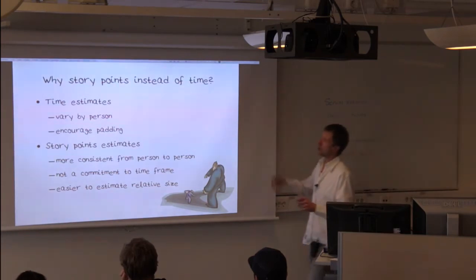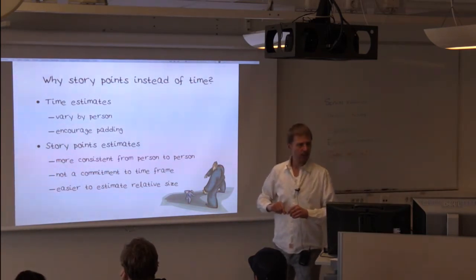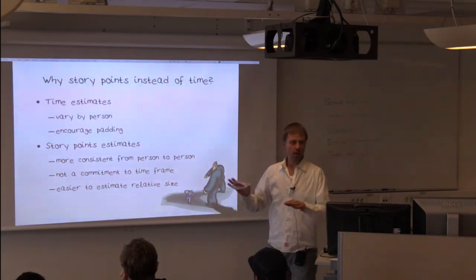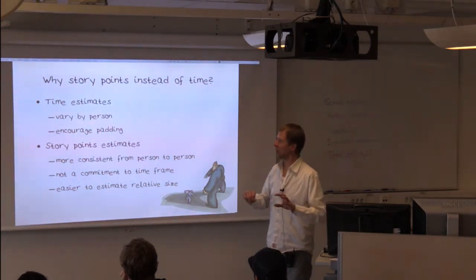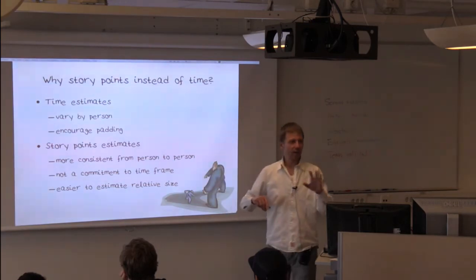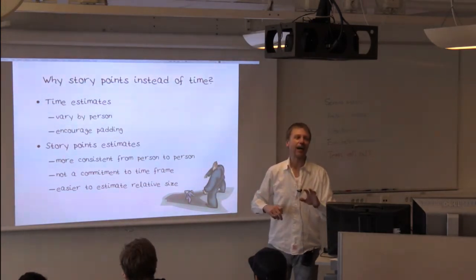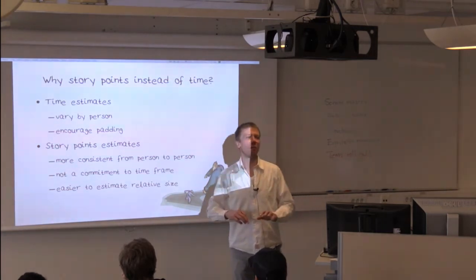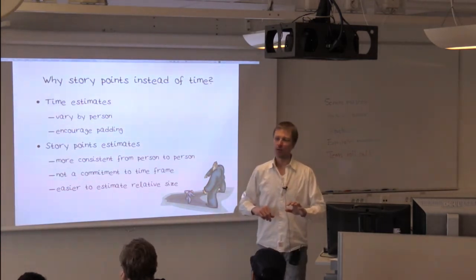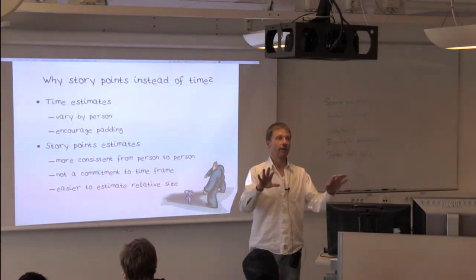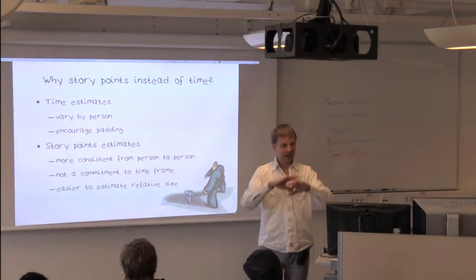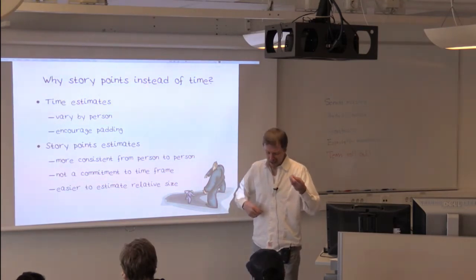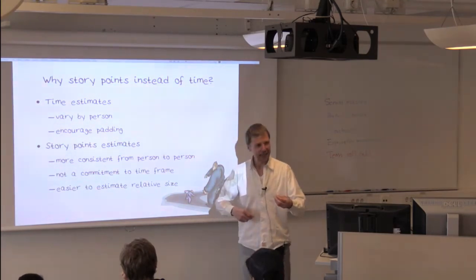So why do we use story points instead of time to estimate things? Well, time estimates tend to vary by person much more than story point estimates. Time estimates encourage padding. You know, I think it's going to take 2 hours, but let me say 4 just to be on the safe side. Well, guess what happens when everybody pads like that? You're going to get wrong estimates. You're going to get estimates that are not consistent with your understanding.